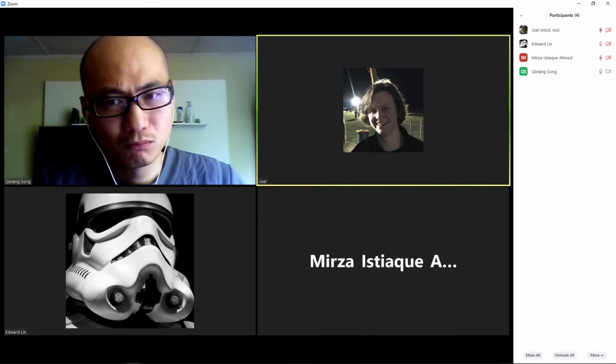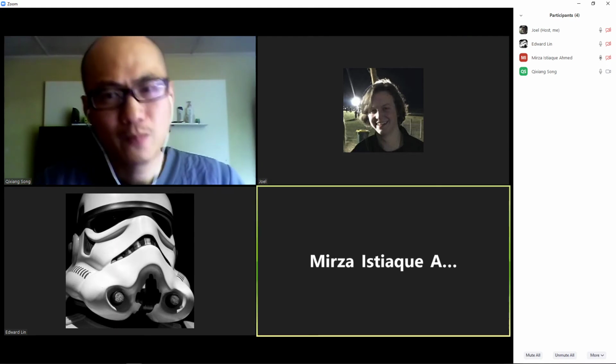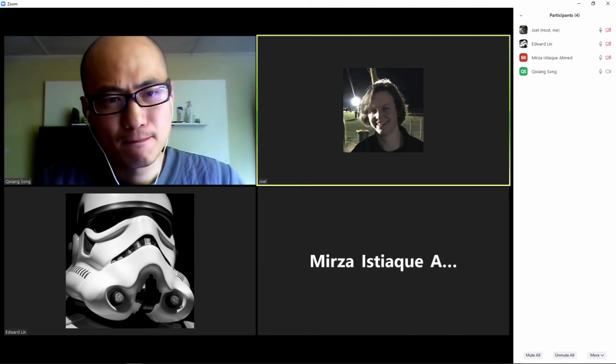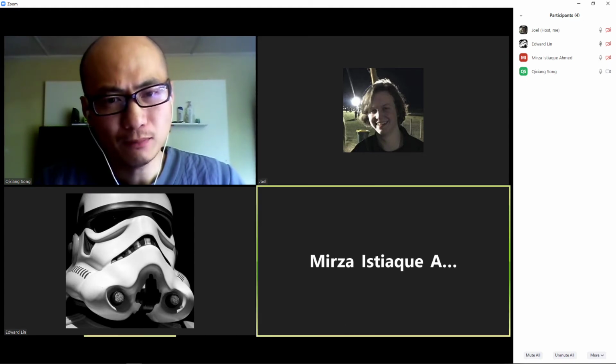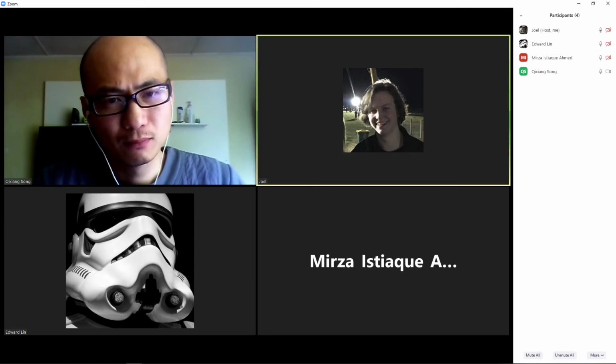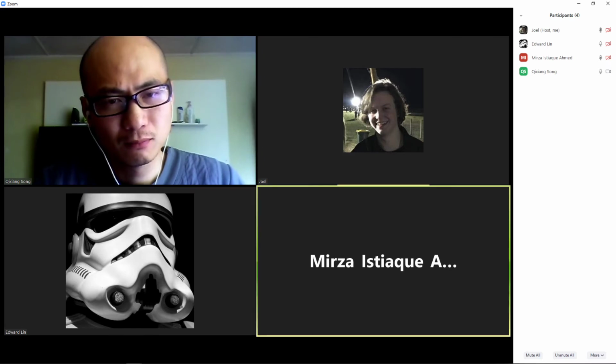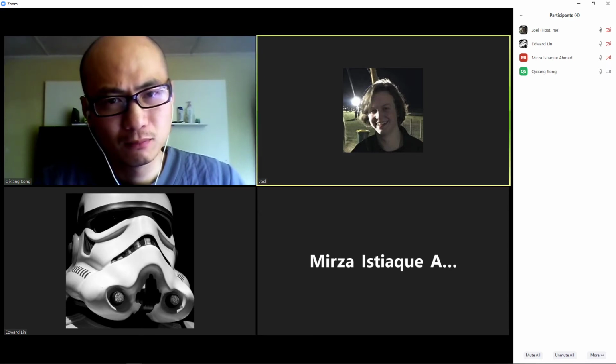Because we won't be able to get the back end and the front end done in one phase in 6 weeks, since the database is going to be really complicated to work with, we'll just try and get the front end working. We do have to do a demonstration at the end of the semester, so if we have just the front end working, we can demonstrate how the UI will work. And if we have a little bit of database stuff working as well, but not yet integrated with the front end, we can demonstrate that if they want us to.